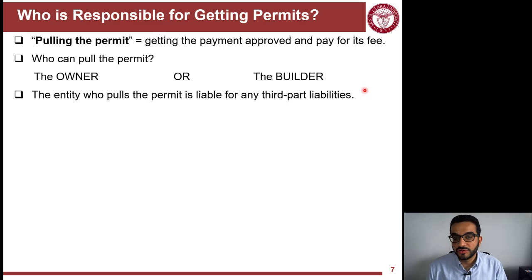So generally, as a recommendation, it's better to have the builder's name on the permit, because now they have skin in the game. Of course there are other measures, but this is a little detail that helps keep the builder with skin in the game and paying attention to safety on site.